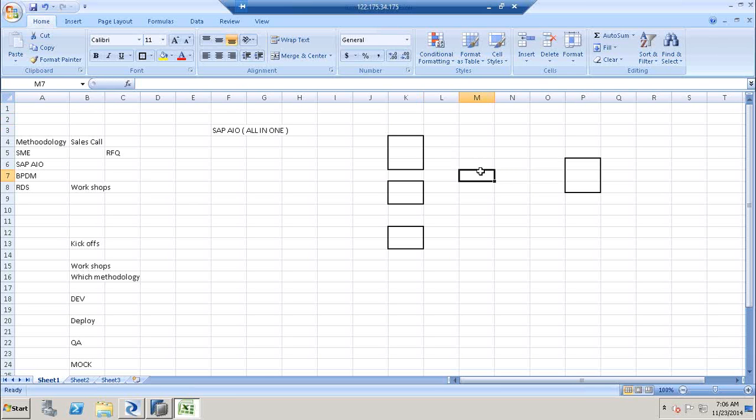So I'll talk to this customer and try to understand where we stand, and once we get this response, RFQs will get RFP, followed by RFP. So once we get the answers, we will see if we have that competency available with us and can we deliver this, and then we'll send a proposal to the customer.